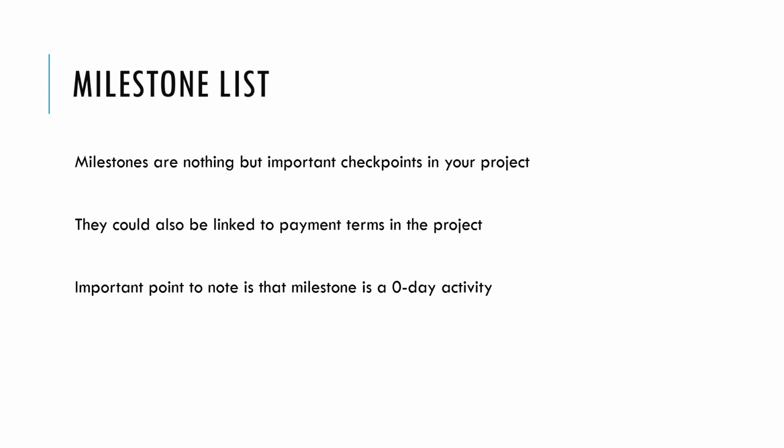You will never have a milestone that says, my code will be complete in the week of the 26th, meaning from the 26th to the 31st we will be completing the code. No, that is not how you define milestones. That is an activity, a total phase of a project, or a total process that you're following. It is not a point in your project. It is consuming a time period.